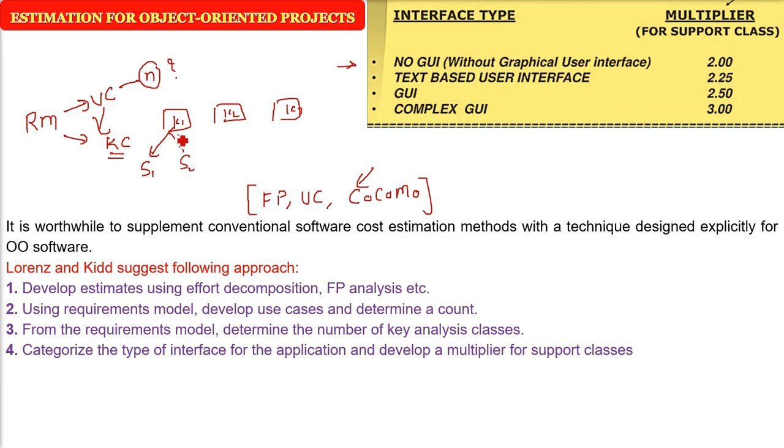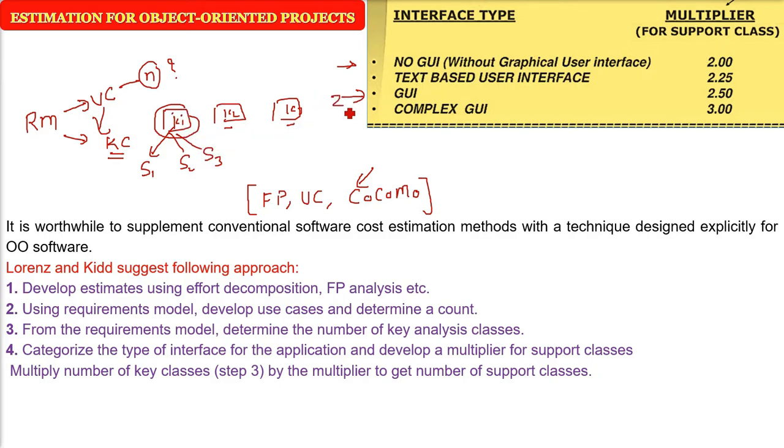Each analysis class will have support classes. To get the support classes, multiply the number of key classes in each category (from no GUI to complex GUI) by a multiplier. For example, if you have GUI-based analysis classes, multiply that number by 2.50. If you have two key GUI classes, multiply by 2.5 to get five support classes. The same applies to other categories - multiply by the multiplier given in the table to get the support classes.